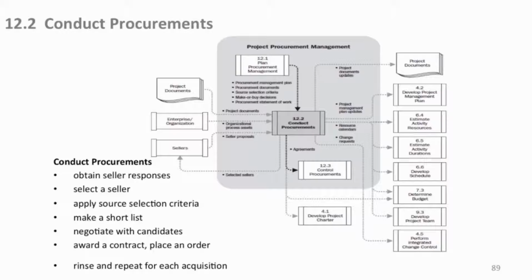The source selection criteria, which are your checklists, perhaps, if you want to characterize it that way, what you're going to look for in each bid. If you've ever done procurement, the original way to do it was to have a ledger sheet. Your requirements down the side, your bidders across the top, and then you can mark the criteria, money across, or a response to certain attributes you need across the top, and you apply certain evaluations to all these in the bottom, and you come up with either the low bidder or whatever your criteria is to make a purchase.